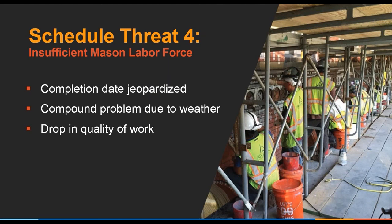Now, the schedule analysis we did, we had to subcontract this out because neither Tom nor I had the time to do this. Independently, we both know somebody who does very in-depth schedule analysis. And what he does first is he visits the project site where he can walk the scaffolding and observe the work being done. That way he can see if there are any inefficiencies. He asks us a lot of questions about what the inefficiencies are, where they need improvement or don't need improvement.